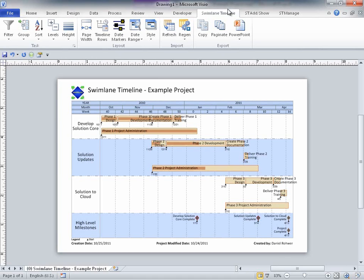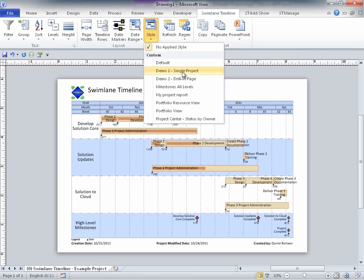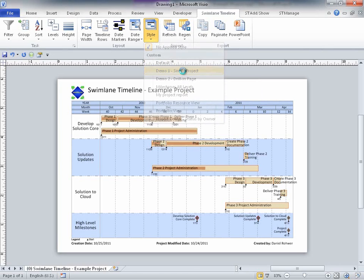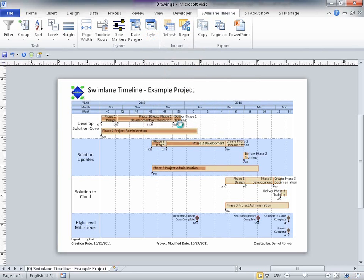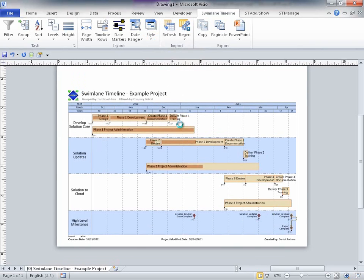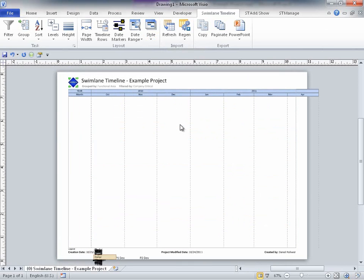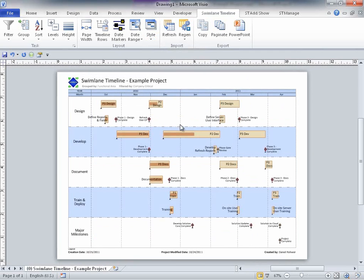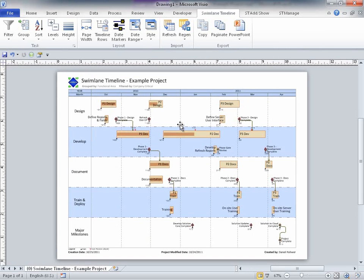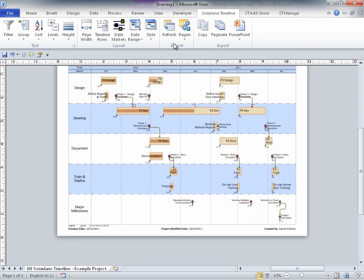Now, with just one click, I'll apply the Swimlane Timeline style that we created in the previous 2007 demo. If you recall, this style performs many actions. It applies the company critical field filter. It shows tasks for all outline levels in the project. It applies task short names read in from the project. It groups tasks by their functional area field value. It shows dependency connectors. Changes the timeline rows to be years and months. And changes the task height to be the tall size.